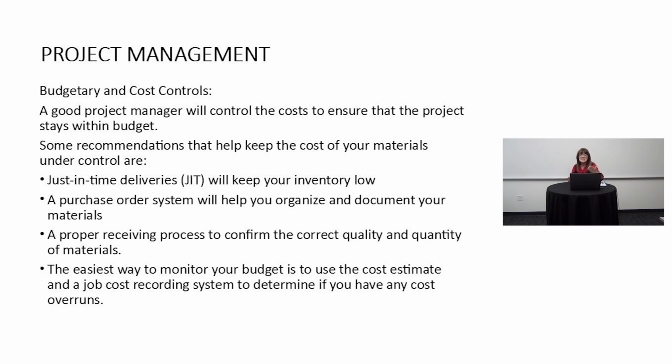The easiest way to monitor your budget is to use the cost estimate and a job cost recording system to determine if you have any cost overruns. On a large construction project, you'll have a job shack. What are they doing in there?